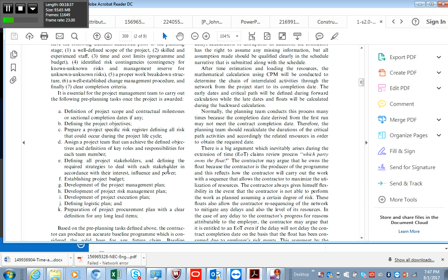It usually would take 10 days for them to prepare it, and then another 5 to 7 days for them to comment on it and return. Now if the 7 days exceeds and you've eaten up all the float, what happens? Who's responsible for that? Would that be the employer? Yes, it will be, right?